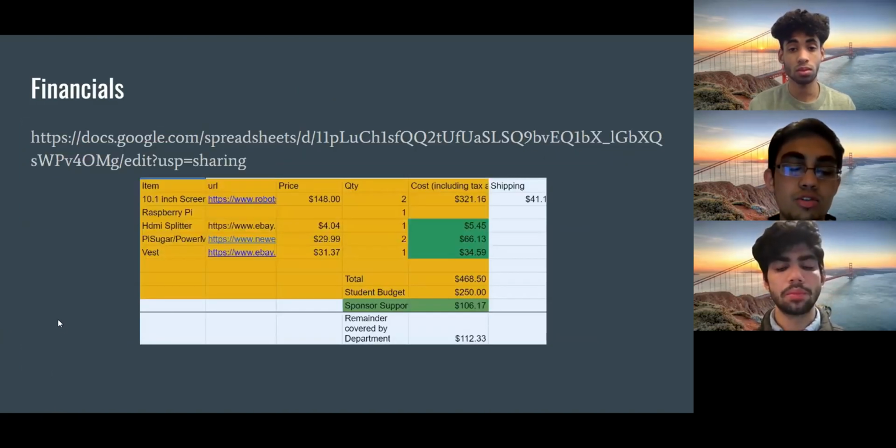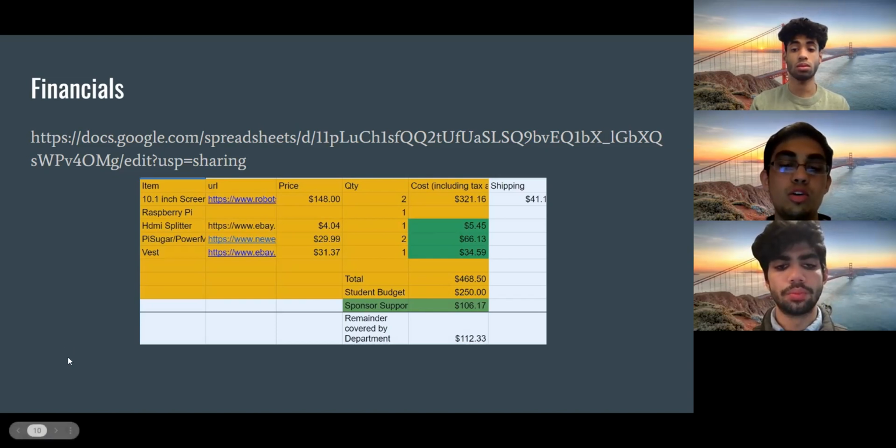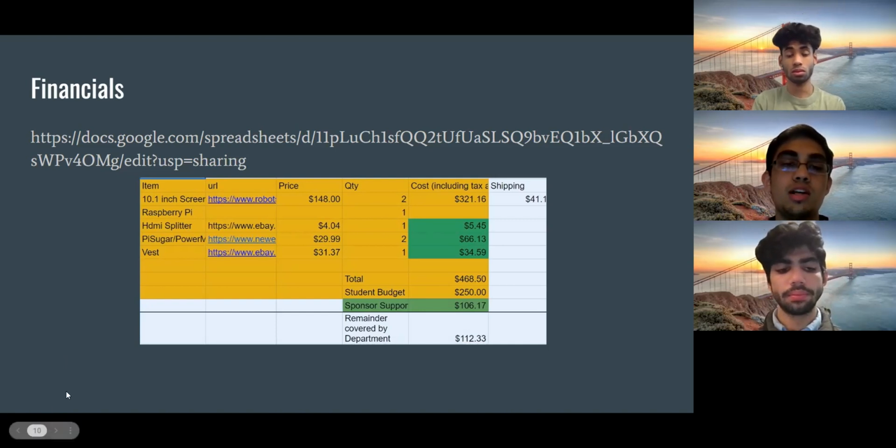As regarding the financials, we have the student budget of $250, which is provided by the senior design department. Sponsor support was an additional $106.17. And any remainder fees were covered by the department as a total of $112.33. While working to fill out the purchase orders, we encountered some difficulties in receiving the orders on time. In order to rectify these issues, we went for expedited shipping, and that allowed us to proceed with the project lifecycle and meet our goals on time.